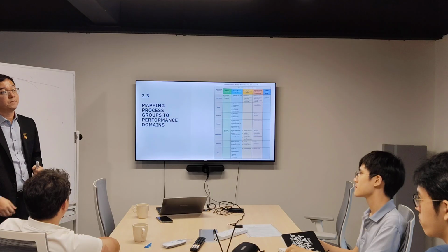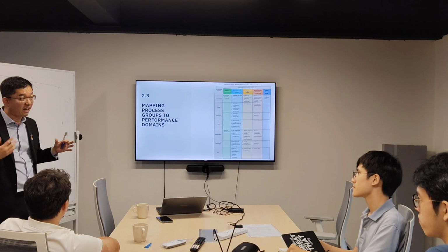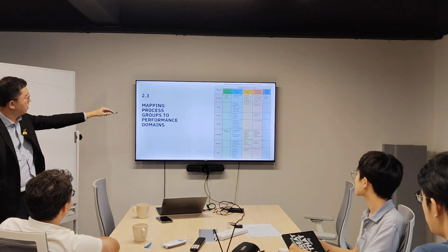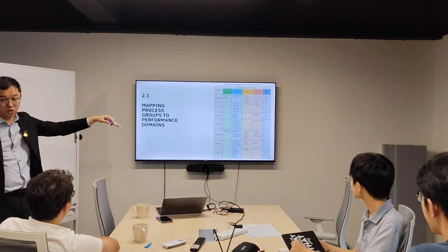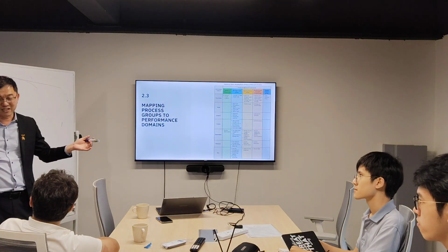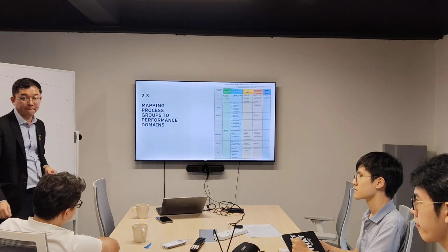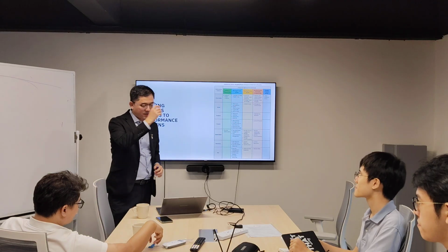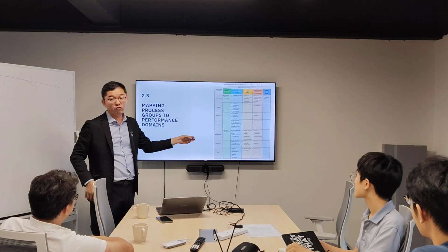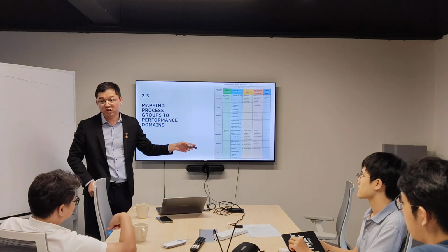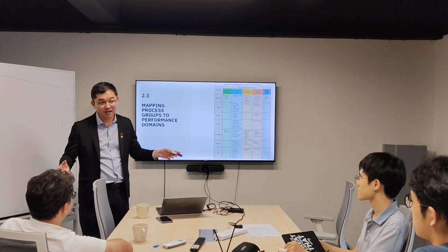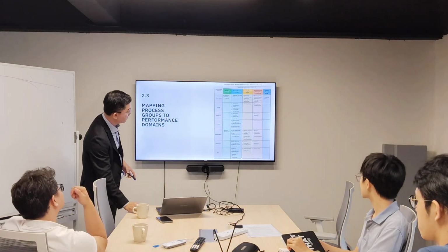Example, let's say you are organizing a talk for thousands of people. This is your planning, correct? Under your scope, you have how many target participants? If you organize in the stadium, you have thousands of people. What is the risk? Crowd management. So when you have crowd management, you need to come back to your resources. You need to have who in your team? Security, police, you need to call police for that, everything, right? So this is how you plan for your risk.